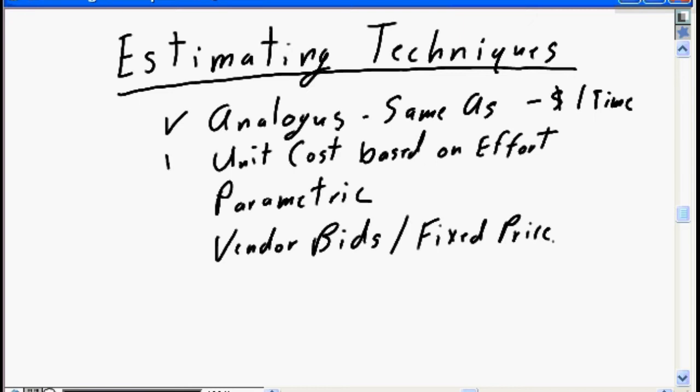You may be able to develop your estimates based on a unit cost based on effort, i.e. you have already gone through your detailed time analysis, you've already allocated specific work estimates to each and every unit of the work breakdown structure. Maybe your cost estimation is as simple as determining the unit cost, remember the direct cost and the appropriate indirect cost allocation for each and every team assignment, times the effort assigned in the work breakdown structure to come up with the cost for the task.